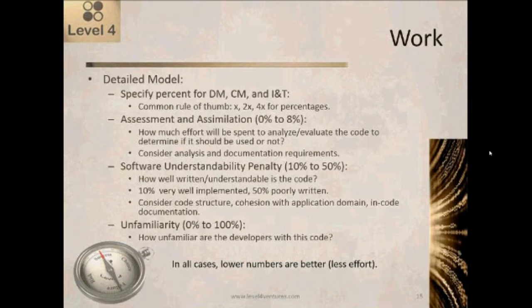When you're setting it in the environmental variable, you're setting it for the project as a whole. Right. Okay. When you're setting it here, you're setting it for specific components of the project. So where this would typically come in is this particular set of modules or this particular interface. People are going to be looking at it for the first time. Yeah. Or this particular report. Well, we change this every year, so we're very familiar with that report.